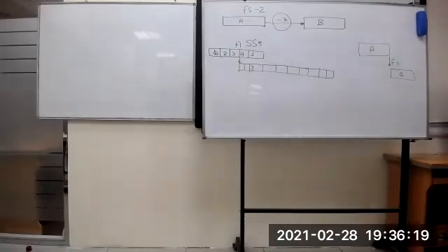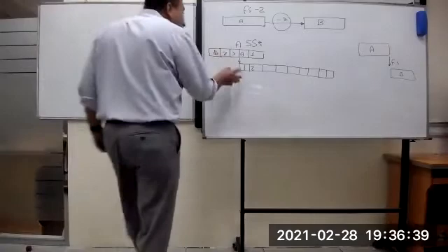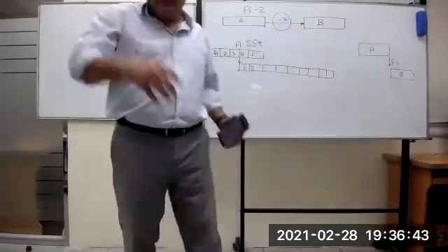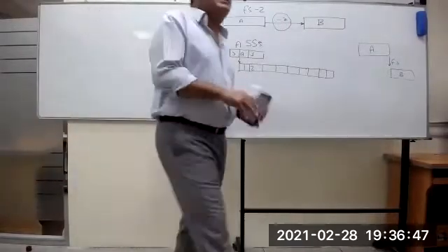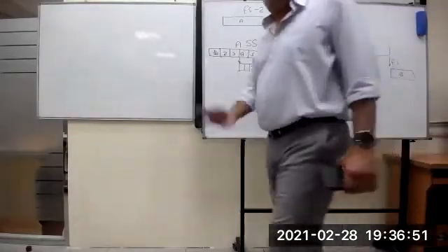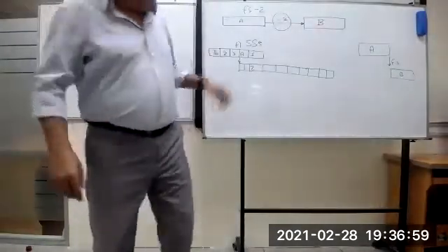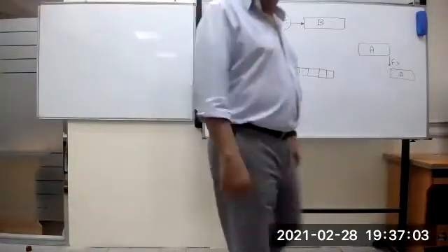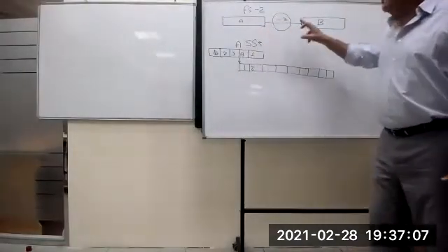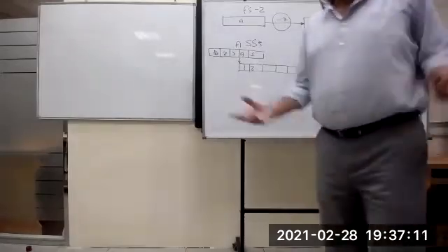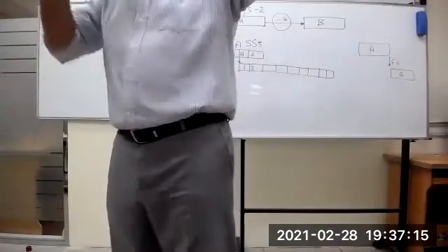I need you to look for must, should, can, cannot, option. In our Primavera or scheduling system, this relation in networking, all the software programmers tell you it is a must. When you are scheduling, and you have two activities with finish to start, when updating, if the first activity is not finished, even for 100 years, the second activity will not start.